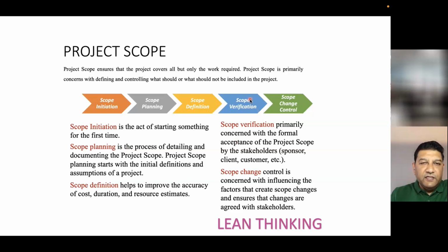And then scope verification, where you are going to verify the scope. Remember, we have a formative assessment where you are going to verify the scope with us. Normally in construction, in real life, we verify the scope with the main contractor, and we verify the scope with the client as well. That is when the client tells you if they need any changes or have any other requirements. So that is the point where you should be asking the client if you need any changes.